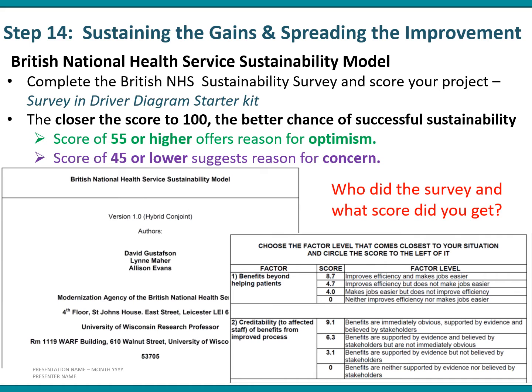Another really good tool to use is called the British National Health Service Sustainability Model. I would read this and actually do the survey — it will give you an indication about the chance of successful sustainability of your project very early on. If you do the survey and add the scores up, if you get 55 or higher, it means you can be quite optimistic about sustainability. If you get 45 or lower, this suggests reasons for concern.